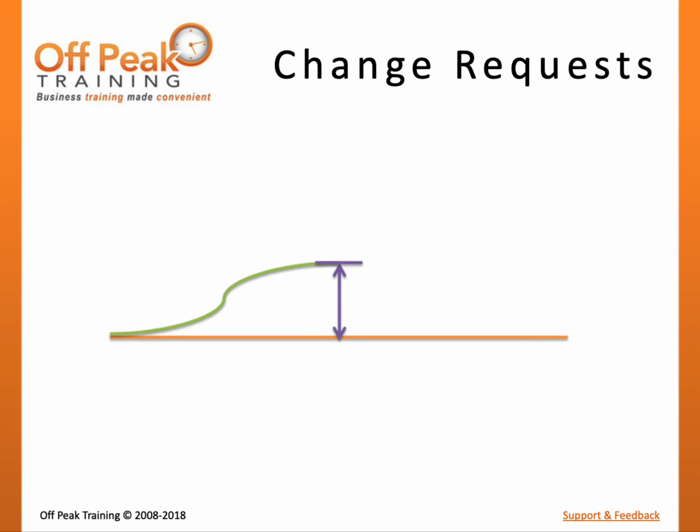Change requests are an output of nearly all monitoring and controlling processes. Anytime a variance between execution and the plan is observed, a part of the project is out of control. In control costs, this might mean that the project is over budget. When this occurs, the project management team should seek ways to reduce future project costs. This could include reducing the scope of work, spending less money on resources, potentially slowing down the project, or using less expensive materials, potentially impacting quality.